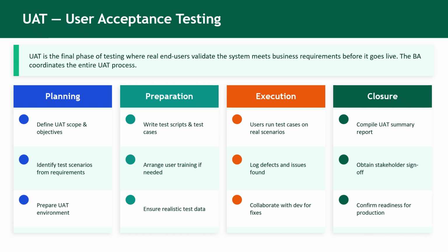Then comes the execution phase. In this stage, actual business users execute the test cases. They perform real-life scenarios to check whether the system behaves as expected. If they find any issues, they log defects and the BA coordinates with the development team to get them fixed.